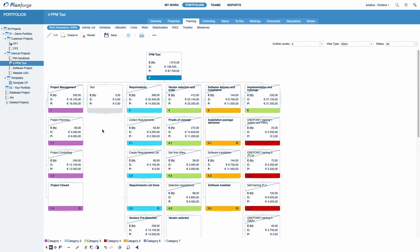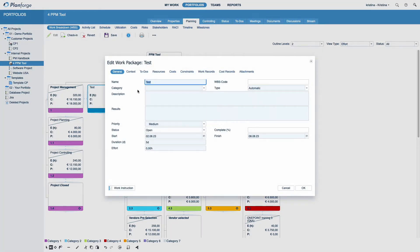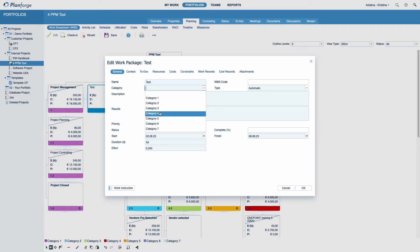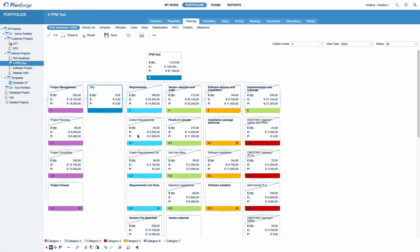By double-clicking an activity or milestone, you can easily inspect or update its properties, for example, the Activity category. You can also save your WBS as an image, for example, to use in a presentation. You can find this practical feature in the Context menu.